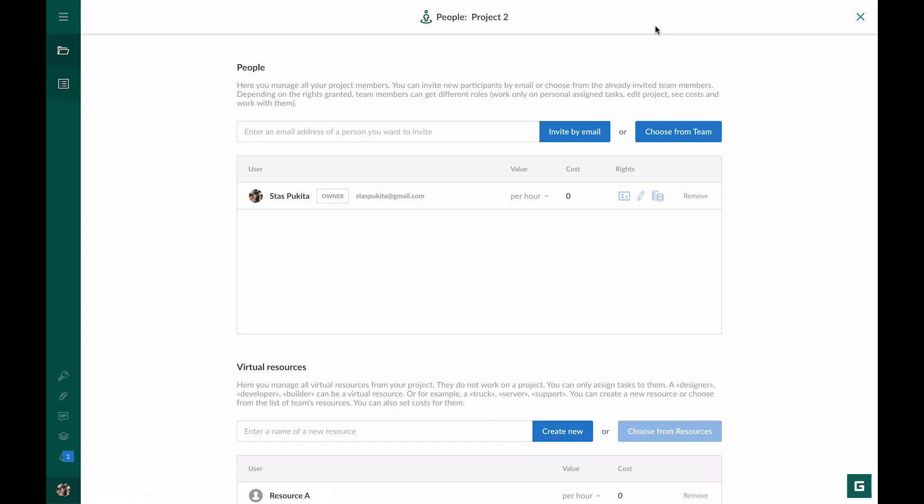In Gantt Pro, there are two kinds of resources: real team members and virtual resources. The latter, in turn, fall into three types: a labor resource, a material resource, and a resource with a fixed cost.